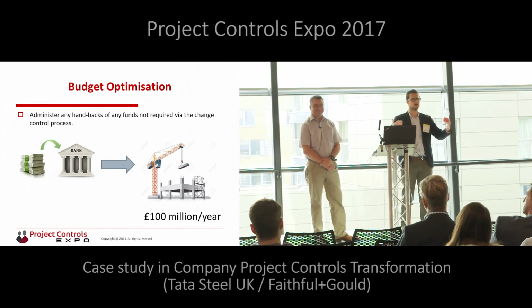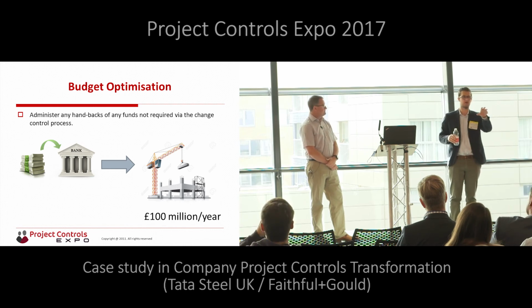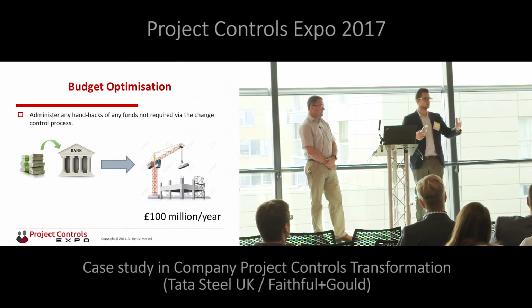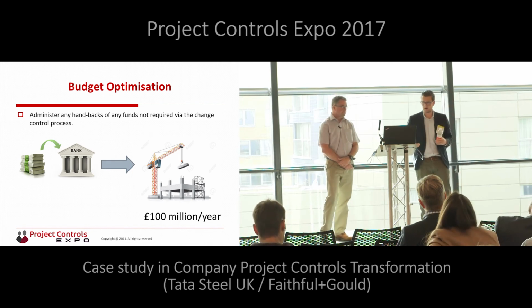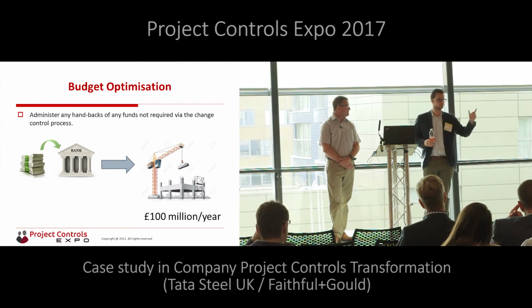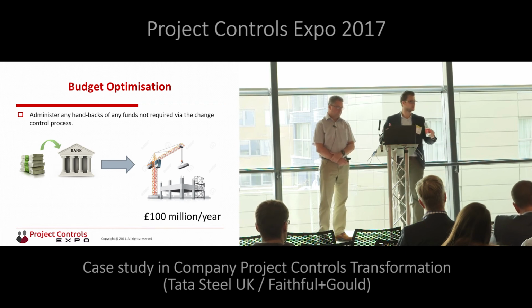So, getting teams to understand contingency and how we manage contingency. If we don't realise a risk in the project and that risk is now past, then we can say, well, the cost of not realising that risk is A, and we feel comfortable giving part of that cost back. That's a sort of mature way to approach risk in a project, which was lacking probably previously. So, it's changing people's mindsets. It's getting them to think differently on a program and portfolio level as well. Because if there's spare money on a project that somebody wants to spend to paint the building or do something to the office, then more holistically on a portfolio level, there's better use of that money. So people's mindsets are changing in terms of how we manage capital and how we manage budgets and risk for that matter.